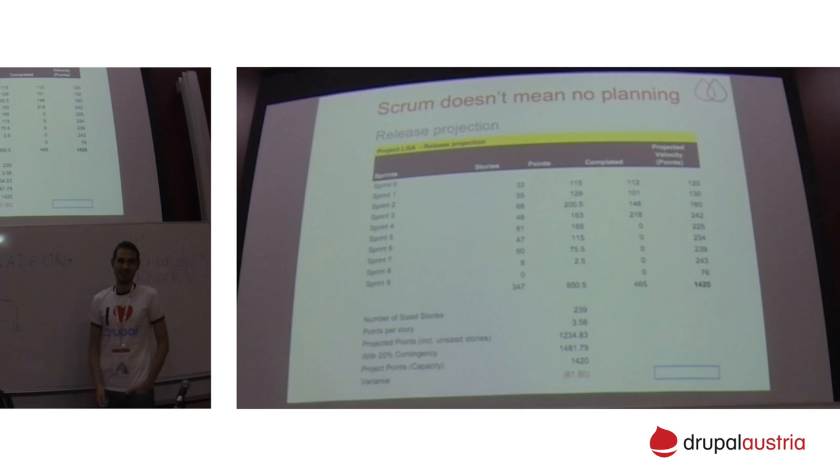Yes, and also in terms of the complexity, aren't you supposed to then estimate the entire backlog in advance before pulling something in the view? How can you determine the complexity of an individual story point unless you have the entire picture? As far as estimates, like a rolling wave approach, you don't know at the beginning all the details about every user story. You will know when you get to that user story or that sprint when you are delivering that user story. Absolutely true.